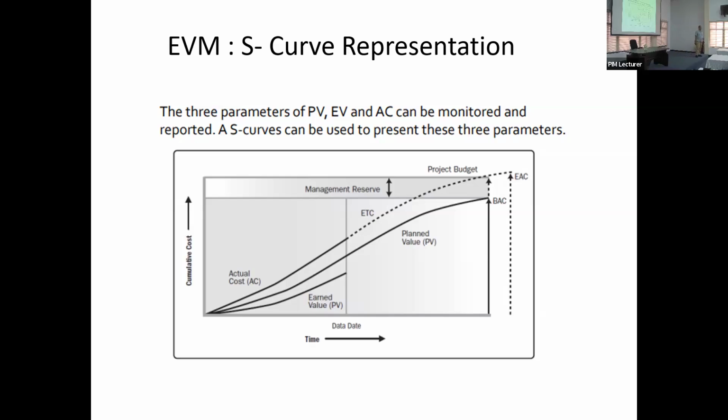So that's the advantage of this calculation. When you do a project, halfway through the project, you can calculate how much more money is required to complete this project and when this project will finish, the timing. It's not 100% accurate, but it gives you a good indication. So that's what this calculation is all about in a project.